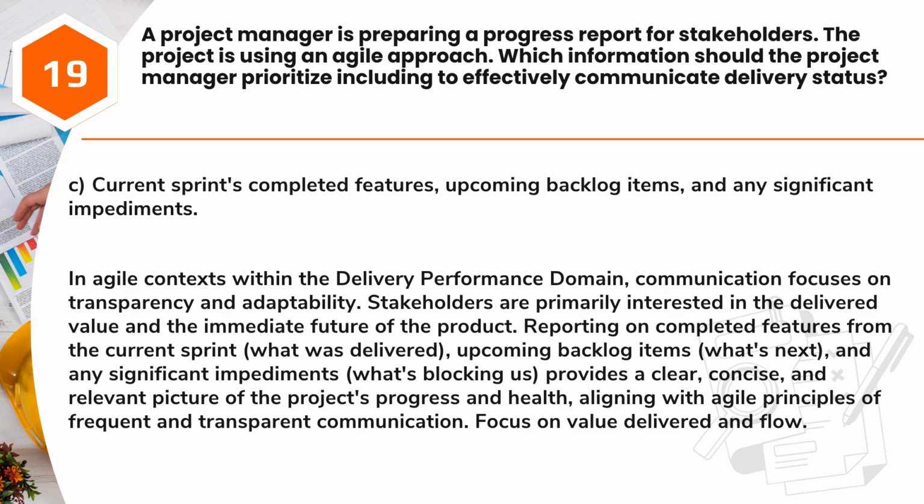Reporting on completed features from the current sprint, what was delivered, upcoming backlog items, what's next, and any significant impediments, what's blocking us, provides a clear, concise, and relevant picture of the project's progress and health, aligning with Agile principles of frequent and transparent communication. Focus on value delivered and flow.